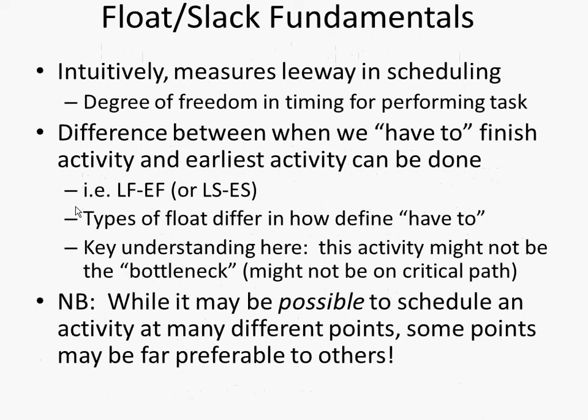So the final thing I'll just say here is there's a concept of float or slack, and I mentioned it earlier. In its simple form, it's the late finish minus the early finish, or late start minus early start. It's going to be the same thing for the simplified case we looked at. It's not based on this particular value. But in this case, we have slack of 2 because the 11 minus the 9 or the 15 minus the 13 is 2. This upper path has slack of how much?